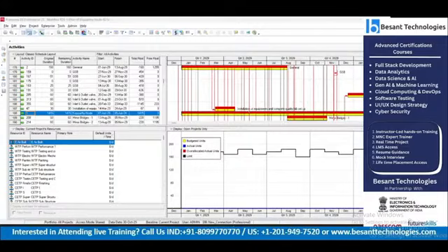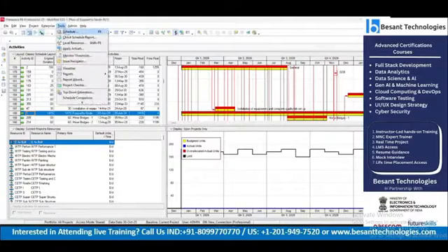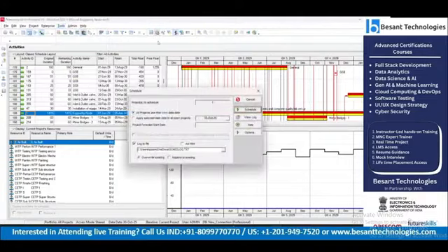Yes, ma'am. So, as we learned, for running the schedule we have options like the Tools, Schedule option, or pressing F9, or clicking this clock symbol. Whenever you do, the schedule runs and this is called the data date, the date up to which we are updating the schedule, or the date on which basis we are updating the schedule. That's about data date.